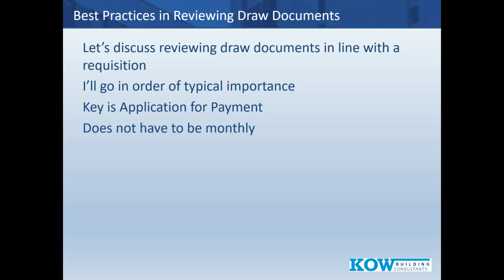Some clients of ours say you must visit monthly. Some don't. Some say you're allowed to visit twice a month. Some don't allow that. When would you do twice a month? Usually fast track, poured in place concrete projects. They're going to move really, really fast. They're not doing 7-day tests. They're doing 3-day tests for concrete cylinders, etc. That is part of the industry. That does happen twice a month. Sometimes it's every other month. We've had certain clients that said, I want you to go every quarter.